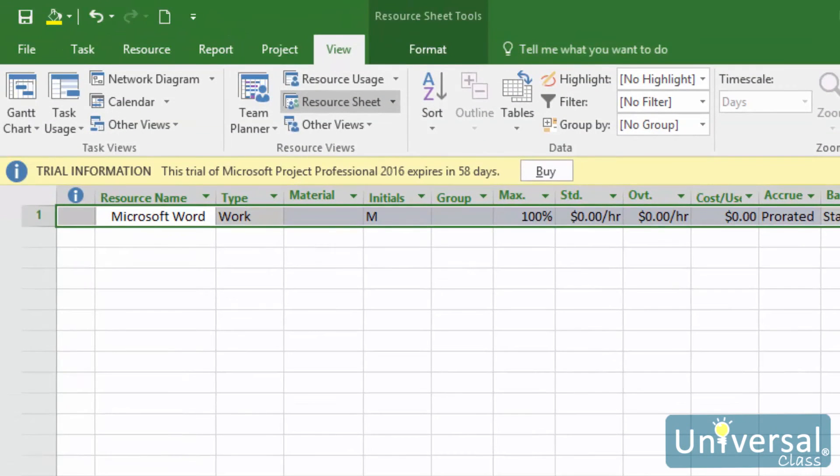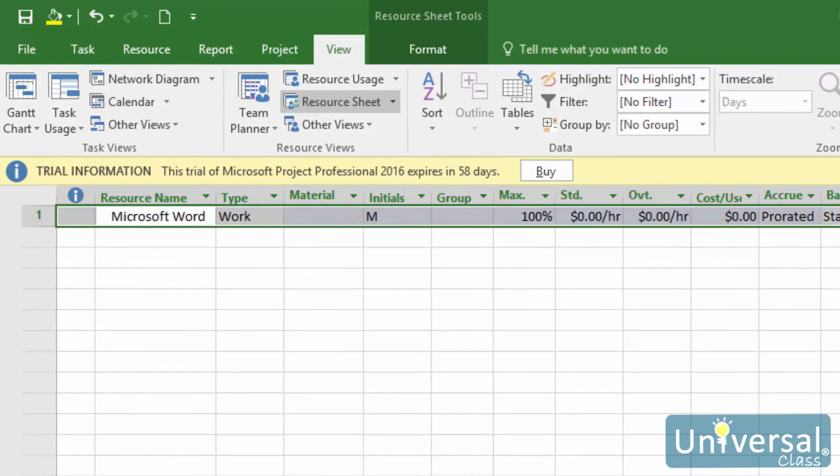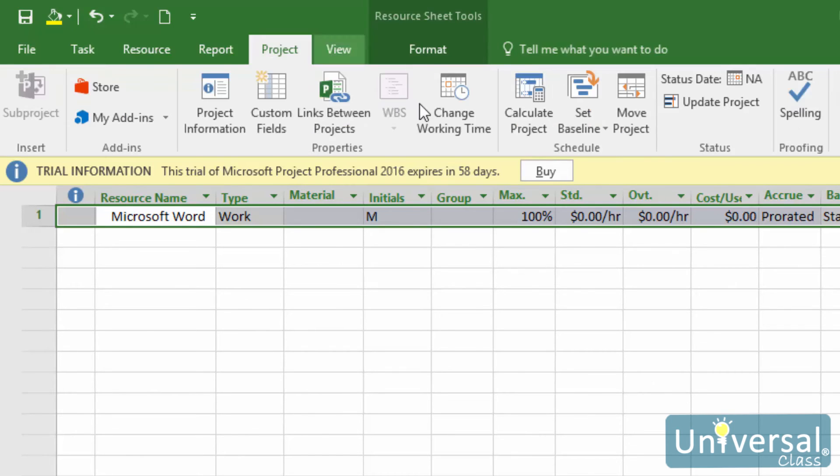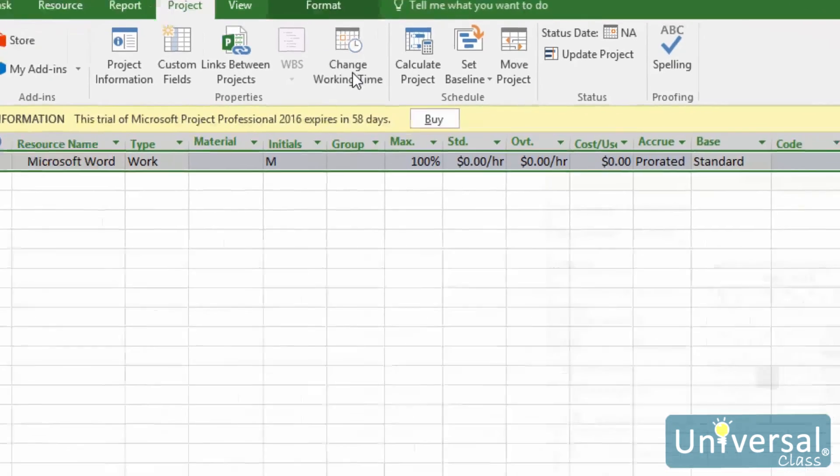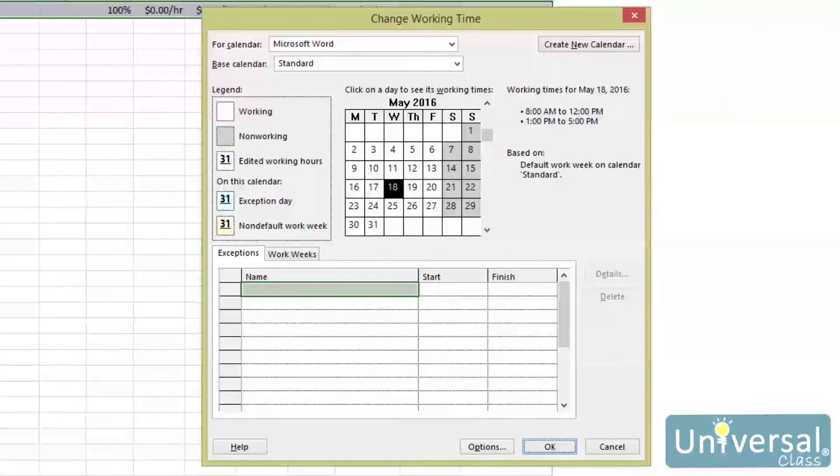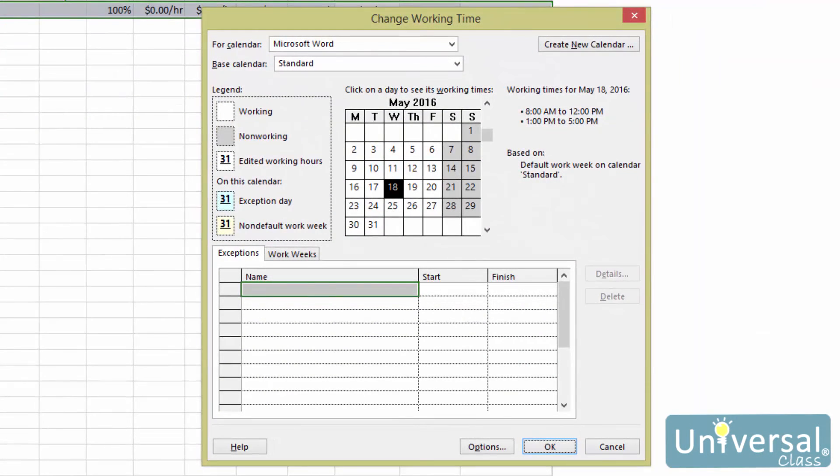Let's say that on St. Patrick's Day, you and your employees will only be working a half day. You can create an exception to the normal working time to reflect this. To do this, go to the Project tab, then click on the change working time button.